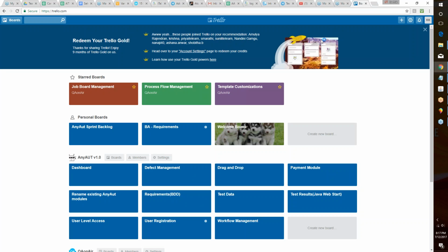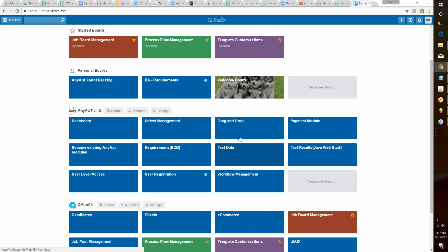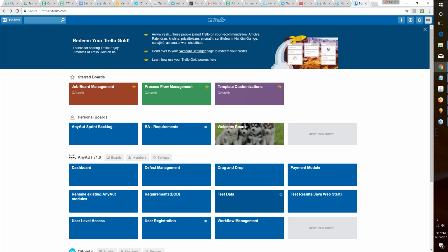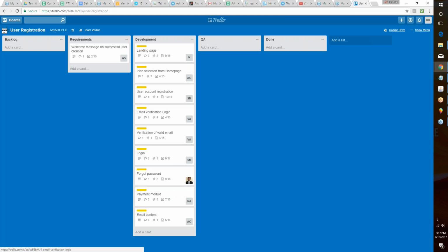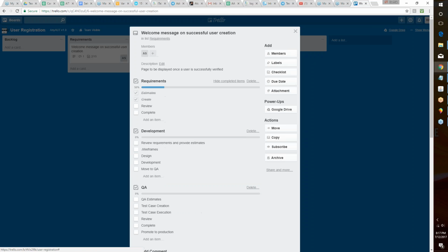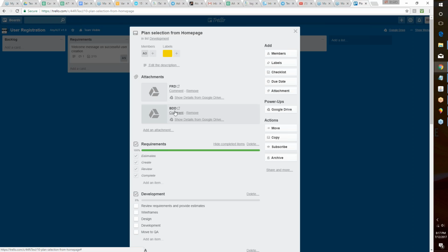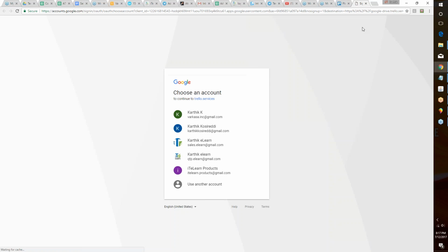We're using Trello as a project management tool. We have created our own buckets or boards, and in each of them we have the status of every feature that's coming and we're building. That is the starting level. We start with the backlogs, which is nothing but epic stories. Then once the requirement is built, they're moved here, and the requirements are documented. They're assigned to team members. Then for each of these requirements, we have the FRDs and BDDs, how this will look. And so this is one.